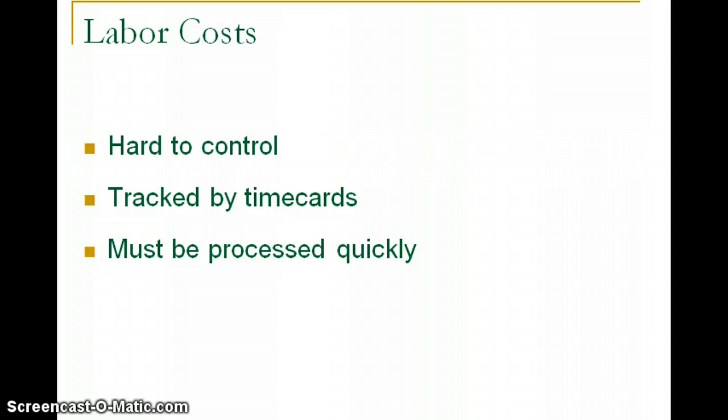Each foreman would be responsible to prepare time cards by the end of the week for each employee that was assigned under that foreman's supervision at each job, and then on the time card the foreman will note the amount of hours that the employee or worker spent in the field, the hourly rate, as well as a description of what kind of activity the worker was performing on the job site, so that they can correlate that activity to the cost codes for tracking purposes.